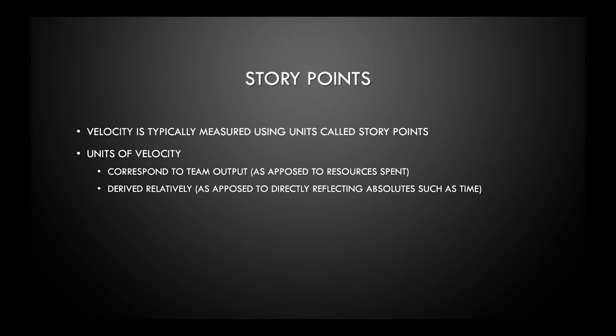The other key concept is relative estimation. Story points do not directly equate to hours. Instead, they represent a relative size measured against other product backlog items. Using story points for estimation allows for the consideration of the amount of work, risk, complexity, and uncertainty involved.